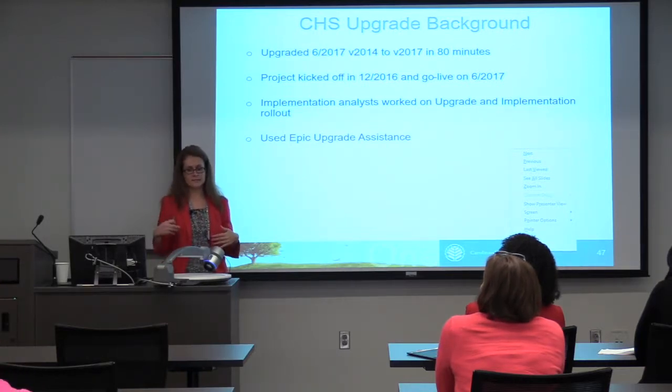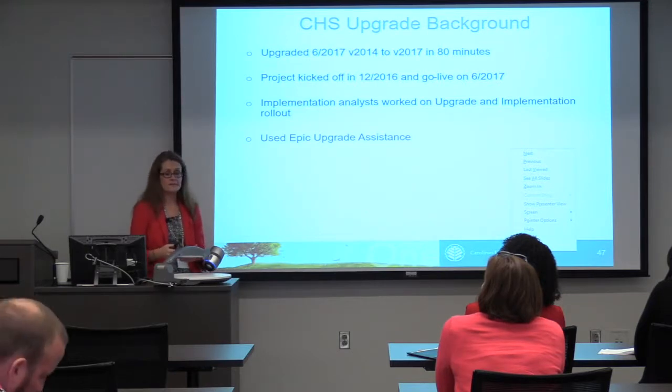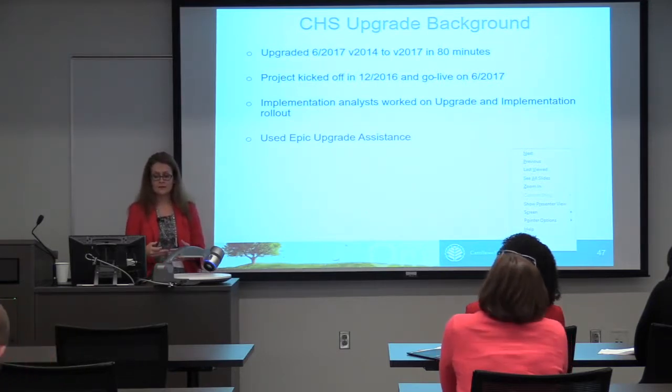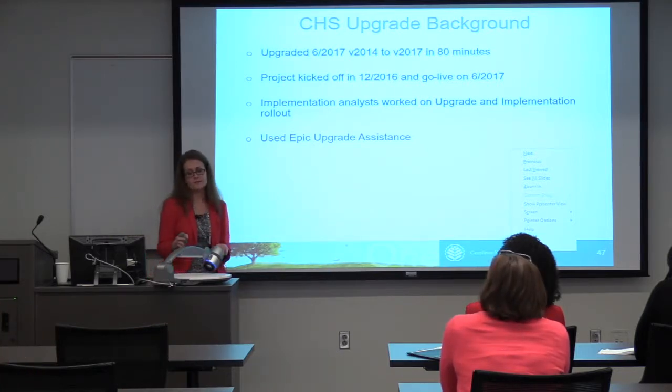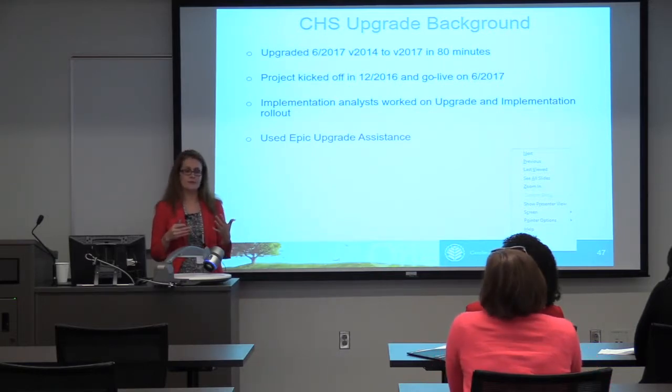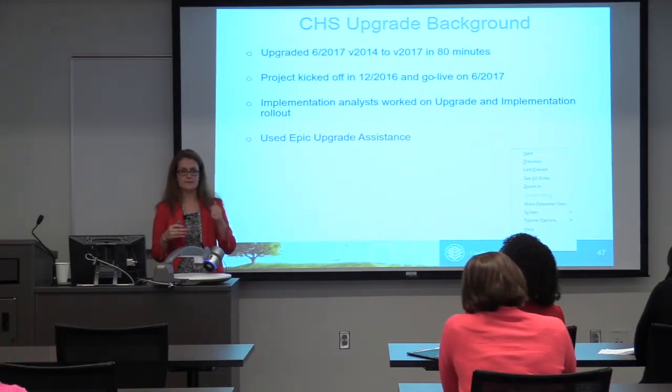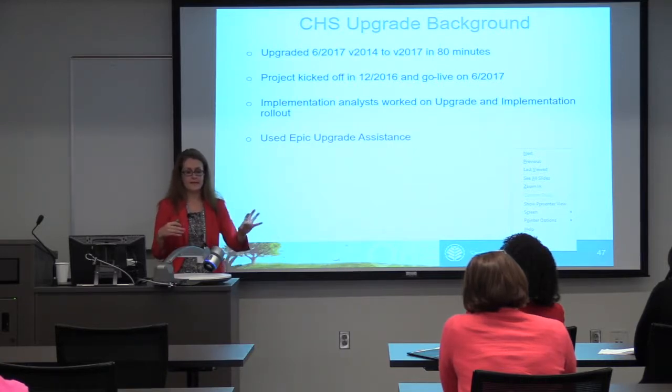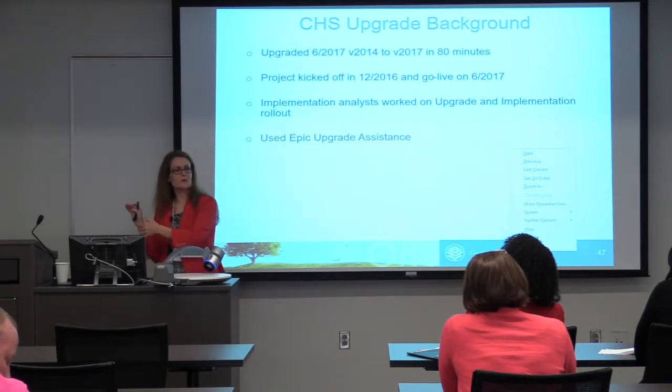As well, we have a Community Connect site, which I'll get to in a second, and we want them to be on the latest and greatest version of Epic as well. So that was our thinking of when we needed to go live. June was a perfect time for us. I say perfect because it was right after our hub facility, CMC, and the Central Medical Group practices went live. So it was good timing to get that out of the way, push this in, and then continue our rollout process.